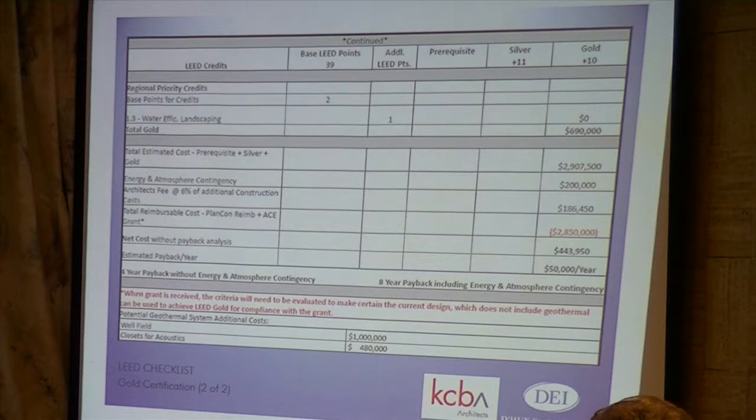So I think it's important for the board to realize that going forth with a $55 million project with that reduced contingency is not the best approach, because you're really cutting things very close. Now, we have line item 1, line item 3, and line item 4, which we're unsure about what the total costs are going to be. But we don't know what those reductions are, or even if there are going to be reductions. So I want the board to be very clear.